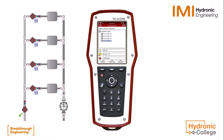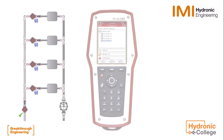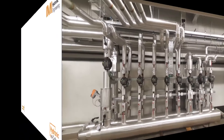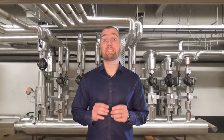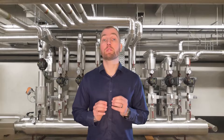You have now completed the TA Diagnostic procedure for this module. Results can be uploaded to HiSelect to produce a commissioning report. For a complete balance, all modules and sub-modules of the plant must be balanced using the TA Diagnostic procedure. Finally, we must optimise the pump settings — see the link on a video on how to carry out VSP optimisation with the TA Scope. Goodbye and I'll see you in the next video.